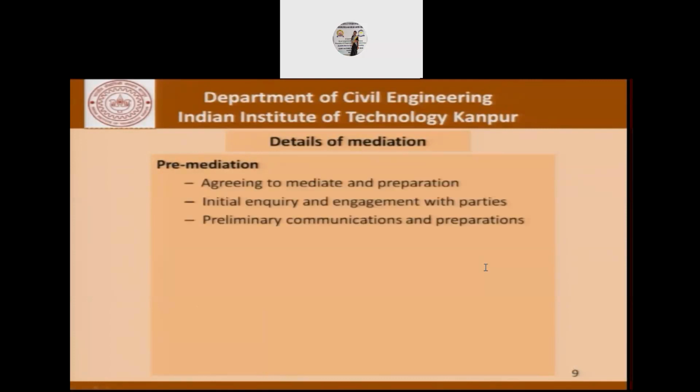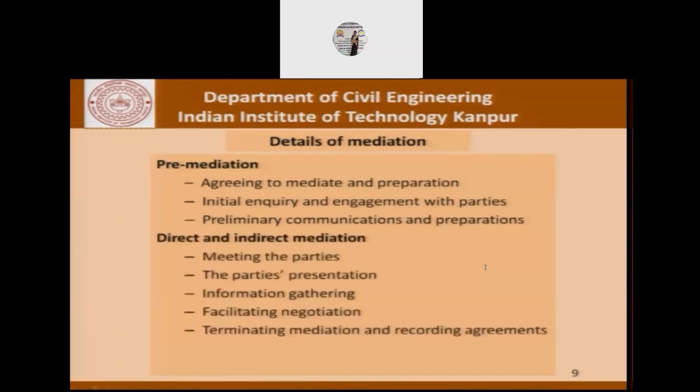It involves agreeing to the process, initial engagement with the parties, preliminary communication, then the communication with the parties, information gathering, basically a presentation of the process, and finally determining and recording of agreements.